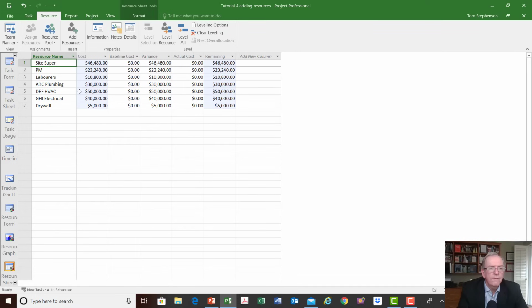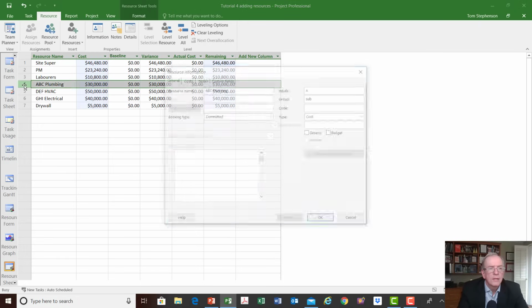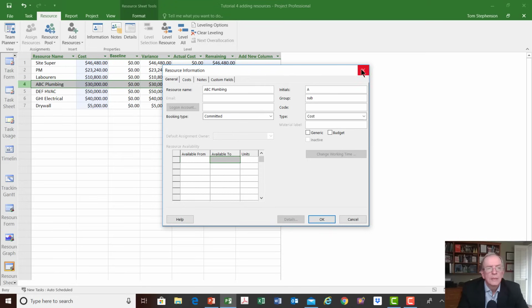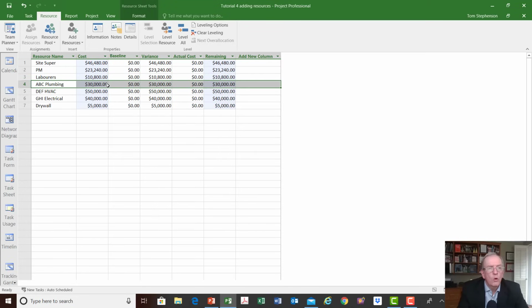Remember the DEF HVAC? That's $50,000. We had two payments, right? One was $30,000, I believe, and one was $20,000. I think ABC Plumbing we had $15,000 and $15,000, and I think GHI we had $20,000 and $20,000. What you'd want to do is make sure that this amount here is totaling what your contract is with them. So you might have 6 or 7 payments, but the 6 or 7 payments should total what your contract is.